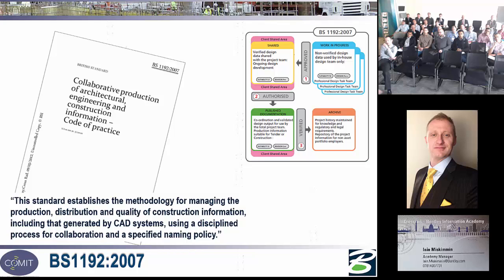However, when I decommission that thing, or when I commission a new major or minor project on that area, what I will do is I will take that information out of the archive, give it to the contractor and say, for your information, this is fit for information. You can use it, but it's not been maintained over the last 50 years or whatever it might be. So this is information that's maintained. This is information that has been archived and is there for information only once you have delivered the asset.